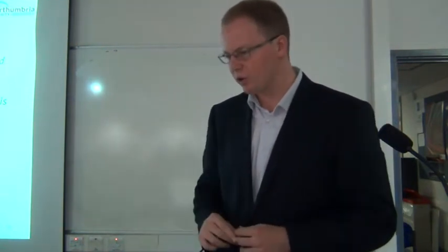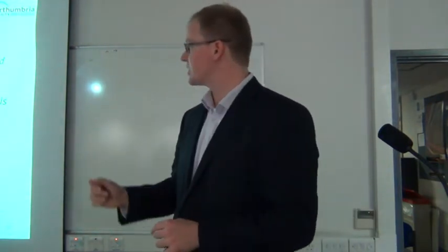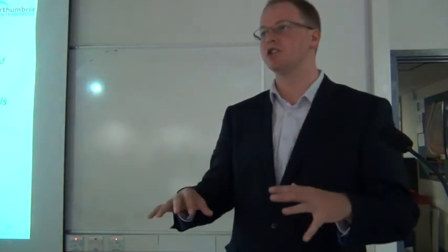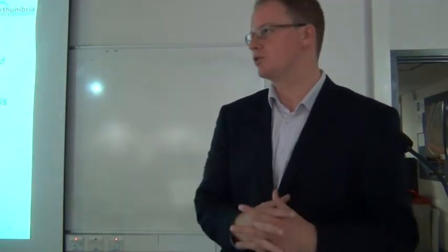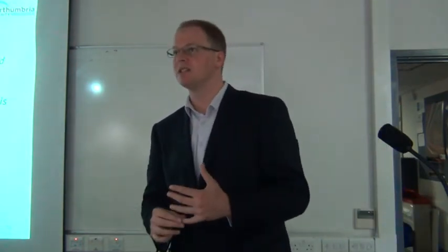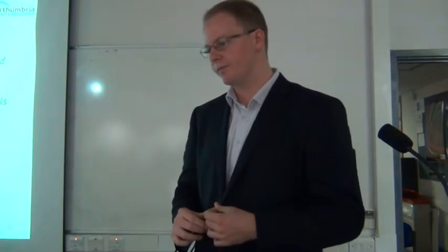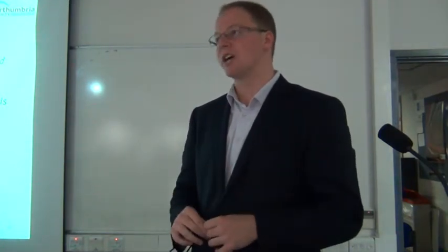When the final scope has been agreed with the sponsor, it's baselined. This is actually something that is very important when we come to the definition stage. This is when we commit to the project. That is when there is no easy possibility of changing the budget, the scope itself, or the time frame anymore. Yeah, this is in the definition stage.